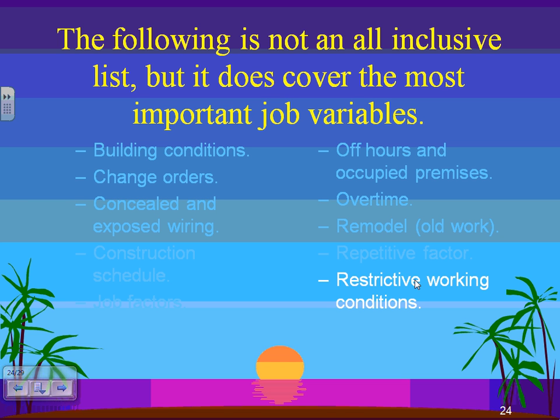If you can do it by half, you get the job. So when we adjust the labor unit, you can increase the labor unit, which is good. You can make money, but be very careful, though. You might not get the job. Or you can decrease the labor unit. If you decrease the labor unit, your chances of getting the job are high. But also, if you made a mistake, your chances of going belly up are high too.